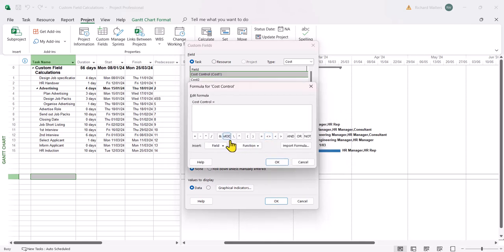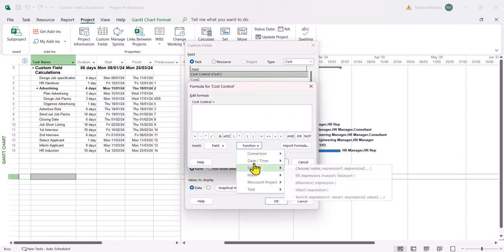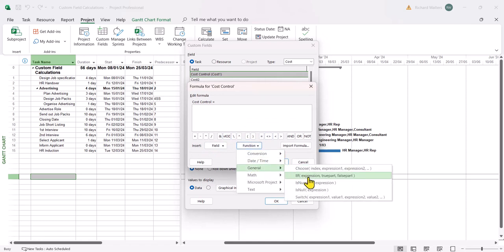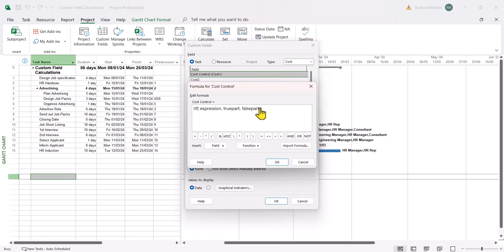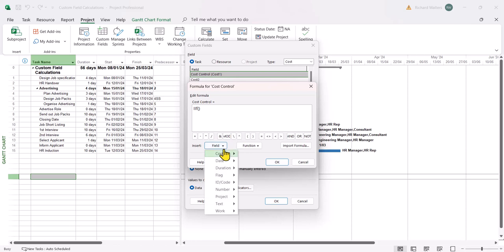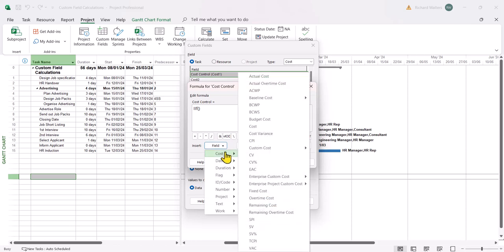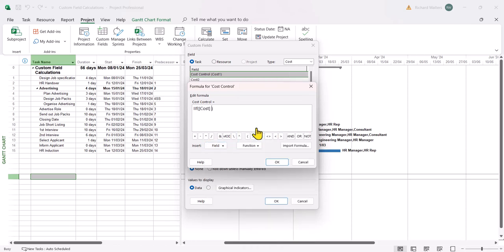Now we're going to use a nested IF so three IFs to do three tests. So first use the function IF, just the general IF. When I'm doing this in Microsoft Project I tend to take away everything in the brackets and just start writing it bit by bit. So we want to use the field and the field is cost, and we're saying if the cost is less than 2,000.